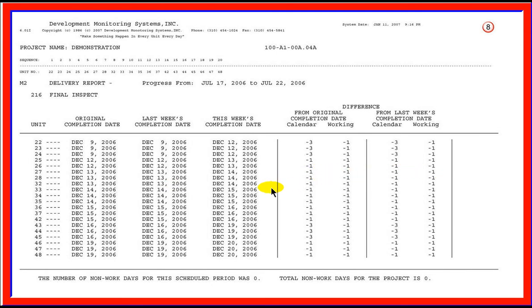This form can also be used to quantify slippage in dollars when the appropriate wording from the contract agreement is applied. Please take note of the fact that the electrician not showing up on Friday, a seemingly insignificant event, cost your job 1 day or 20% of 1 week's progress. This is the type of slippage that the DMS system can help eliminate.